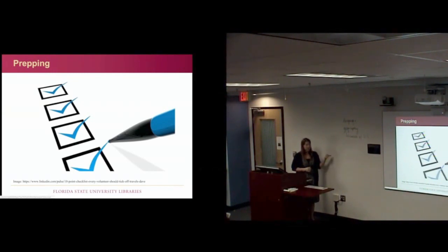At this point, you're also going to finalize your project task list in whatever project management tool you're working on. You should have a really good handle on what steps are needed, what workflows you might be using at this point. You're also going to finalize your timeline, because now you know the exact tasks and the exact amount of material you have, and you know your availability for the project at this point. So you're going to actually go and put those deadlines in your outline of your project tool, whatever it is you're using.